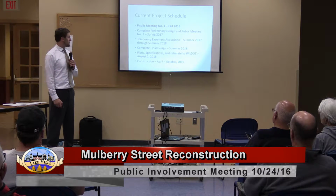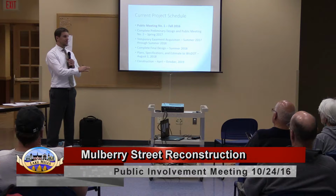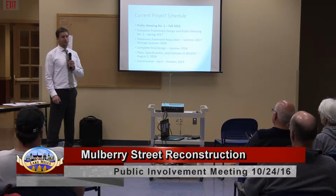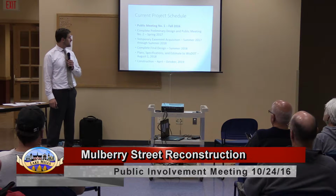next public information meeting. Temporary easement acquisition will occur from summer 2017 to 18. Again, temporary easement is very important because we're not going to be requiring any land permanently. It'd just be for temporary grading as part of the project to match back into the yards and such.